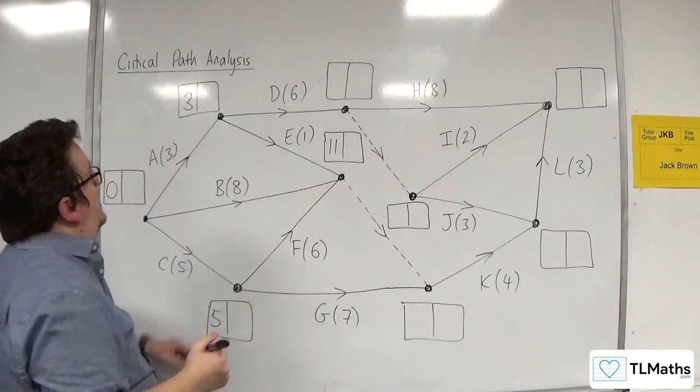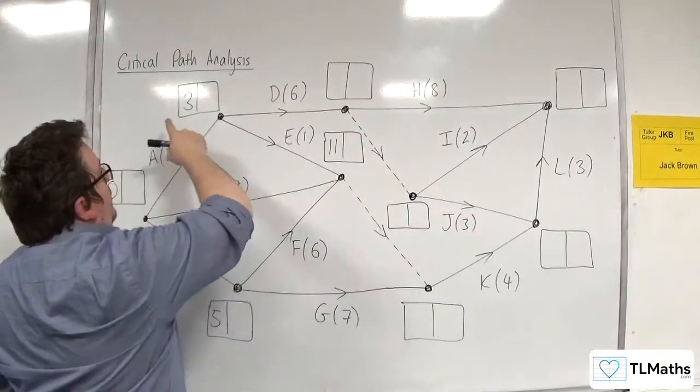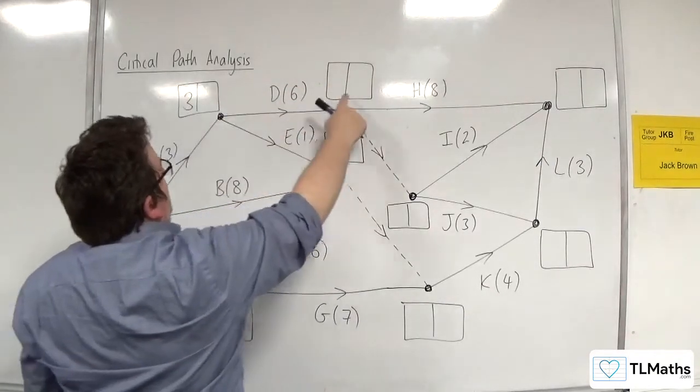So let's look at this box next. So there's only one route in. 3 plus 6 is 9.